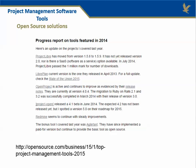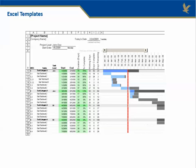These tools do a lot of things for you automatically that previously might have been done by hand using something like Excel. For example, you enter the task and the duration, and it automatically creates a Gantt chart, a network diagram, and locates the critical path. Other supporting tools — like Excel templates — may not do all that for you, but if you're familiar with Excel you might find them easy to use, and for a rather simple project it may be sufficient. In fact, during my career in industry, I spent several years with Panasonic, and only in the last couple of years did they move away from Excel templates into MS Project Server. So you'll see a range of different tools used out there in industry.